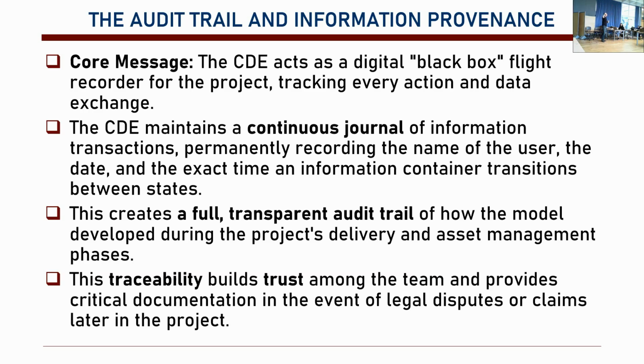Then you can always go back and check if the cables were properly represented in the model, or if that information was given. If it was given, then it is the mistake of the builder. If it was not given, it's the mistake of the designer. So we need to figure that out.